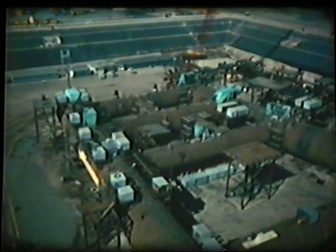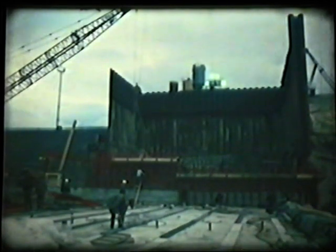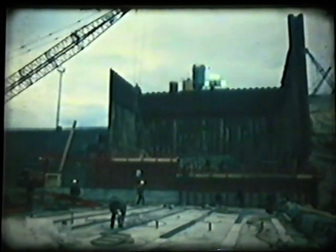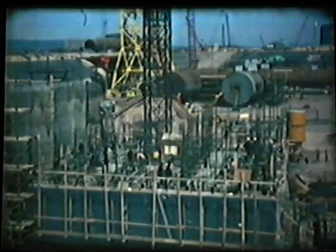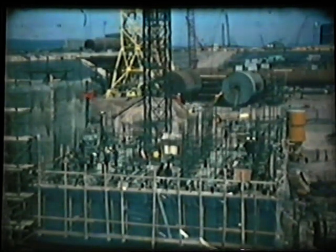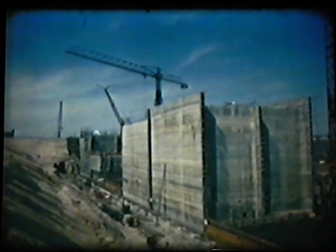During the assembly of the structure's flotation tanks, construction of the entrance works was also in progress. It was to include the longest floating concrete gate in the world. In designing the graving dock, the engineers had used the principle employed by most children at one time or another when playing boats on the beach. A hole is dug, the boat is placed in it, and the water is let in by cutting away the sand between boat and sea. The boat can then be floated out.